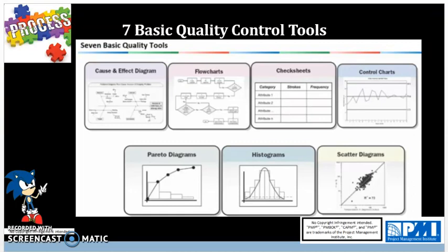And Pareto diagrams, as we see here, are focused on the Pareto Principle, where we determine the most frequent occurrences of a problem, and the line in the diagram shows a cumulative adding up of the value. Basically you are trying to figure out the vital few and the trivial many. That is the concept of the Pareto Principle, where we look at the vital few to focus on the majority of the problem and fix the majority of the problem by focusing on just a few of the root causes, thereby meeting the customer needs. That is the essence of the Pareto Principle.